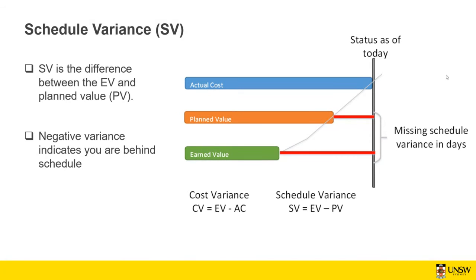But the 6 months is gone, which is the time of your planned value, and you haven't completed that job. Only 2/3 of that is completed. So 2/3 of 30K is going to be 20K. So you still need to run after that 6 months. You need some more days in order to finish that job, so that the 30K that you planned is going to be completed.